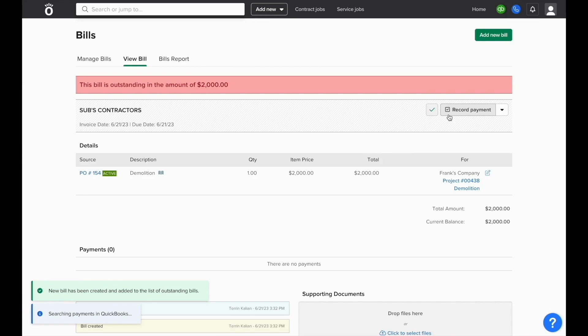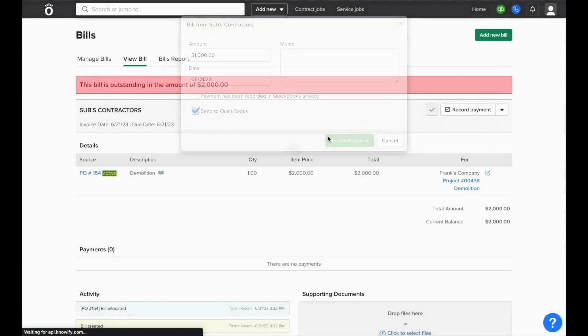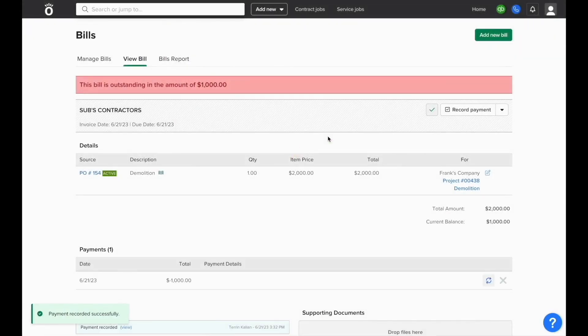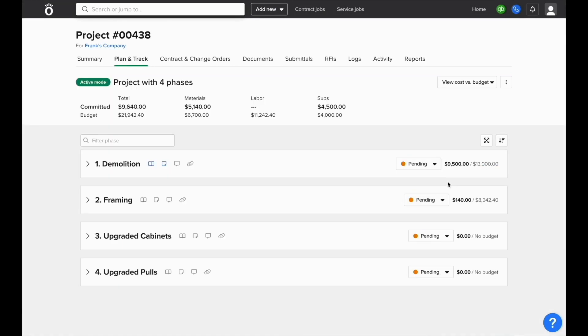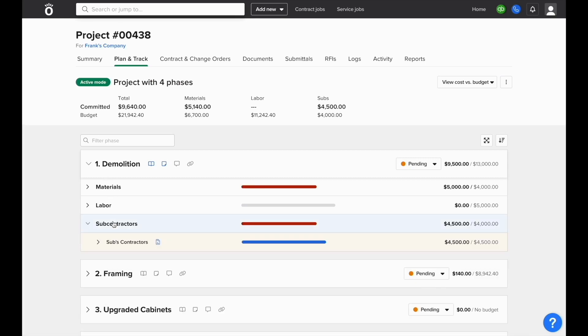When the bill is logged, you'll also have the ability to log payments including partial payments against the amount billed to date. This way, Knowify can give full reporting on subcontractor budget, contract value, billed to date, and paid to date and it'll all be shown inside the phase under the subcontractors tab for this specific subcontract.